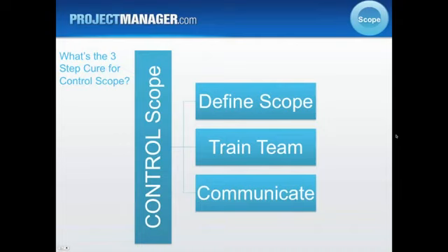You could coach your team members to say something like, hey, that's a great idea. Could you maybe email that to me, and I'll submit it to the change control board? Or something as simple as, I'm not sure, can I get back to you? Or, again, just a simple email request. And in that way, the team member can email the project manager, and then you as the project manager can take it from there and get it to the change control process. But I think it's just a constant training thing. And again, paint them a picture for what goes wrong.